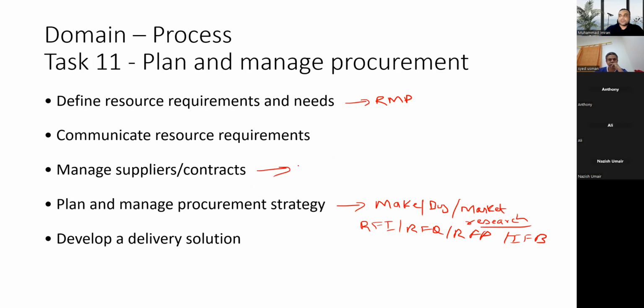Which type of contracts can we make? We can make fixed price contracts if the scope of work is known. We call it FFP, firm fixed price contracts. It also has three types, if you remember. We have firm fixed price contracts. We have a fixed price plus incentive fees contract, where you want to motivate the supplier for objectives, and fixed price economic price adjustment, where we can add any changes because of the government.